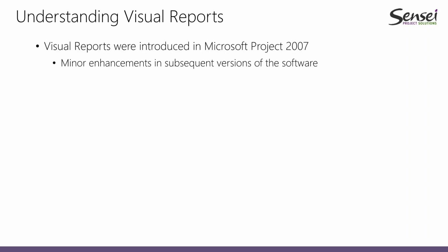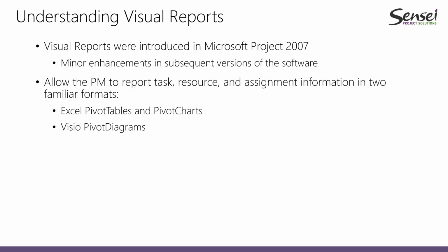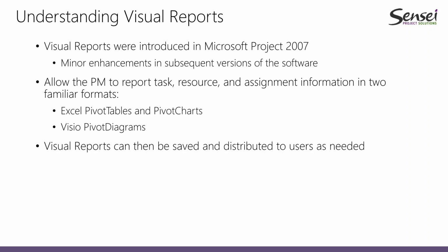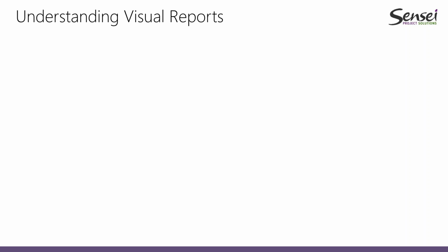Just to brief you about the visual reports, they were introduced in Microsoft Project 2007. What they allow you to do is to see your information in Excel pivot tables and pivot charts, and also in visual diagrams. When visual reports are created, we can distribute them to team members and whoever needs this information.